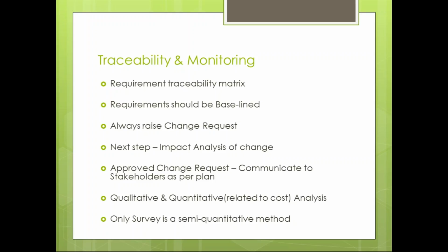Traceability and monitoring. Again, requirement traceability metrics is very important here. During this phase, it is very important that we know what the baseline requirements are. Based on that, if any changes come in, proposed by any stakeholders, it is mandatory to raise a change request before doing anything, or in any scenario wherein they say there is no impact, or the key stakeholder might suggest something.